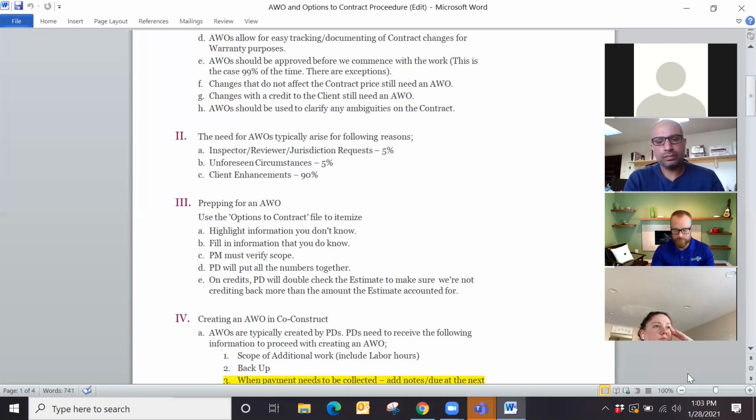So my approach is always to talk to the client first, see what their temperature is, and then go case by case. If it is not a major deal, so it's a huge project, this client is going to give us a good referral. We've been doing well so far. This is the one thing that's going to put a bad taste in the client's mouth, and it's not like a huge cost. That's discretionary. I would make the decision if I want to waive the cost and do something nice for the client and move forward. But if it's a significant cost, I think I'm going to attempt to collect on that additional work order. But again, it varies from client to client.